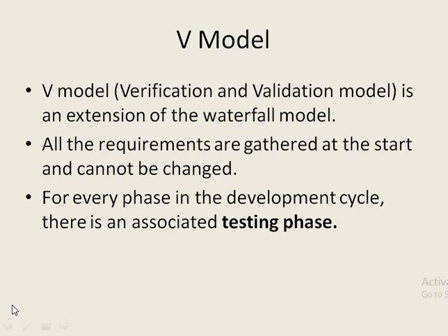In waterfall model, all the phases of software development life cycle take place in a sequential manner. That is, the next phase of software development is begun only after completing the previous phase. And each and every phase in the software development life cycle produces some documentation, and this document will serve as the input to the next phase. That is what we saw in waterfall model.